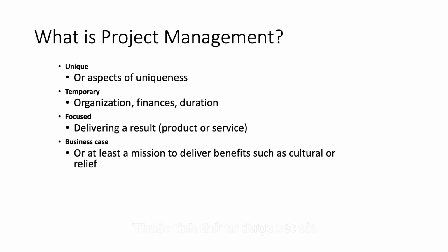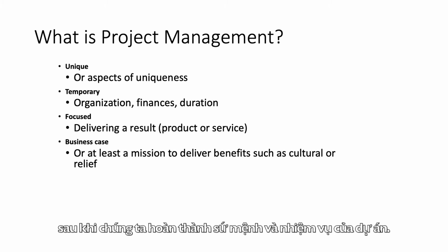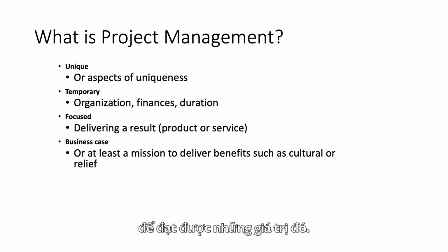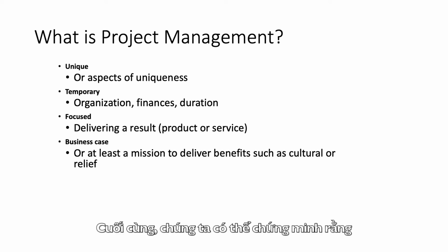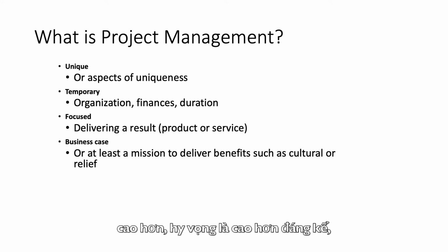The fourth attribute that we're considering in defining project management is business case. What we mean by business case is that we can describe what the benefit is of achieving the outcome and the mission of the project. And then further, we can look at the cost of executing the project in order to deliver that value. And we can then conclusively show that the value created by executing the project is worth more, hopefully significantly more, than the cost associated with executing the project.